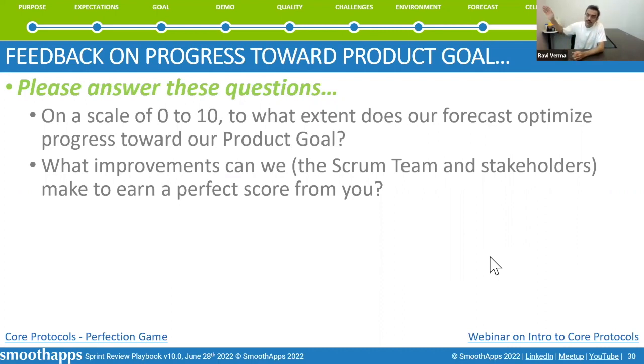We said, we've got people all the way from India to, let's say, the West Coast. Can you give us a 90-minute window that causes minimal conflict in the schedule of the C-suite, plus will cause the least discomfort across the time horizon of our team? They gave us like 9 or 10 o'clock Central Thursdays. And that's what we did. Now we realized that was inconvenient for some time zones, but we tried to do that.